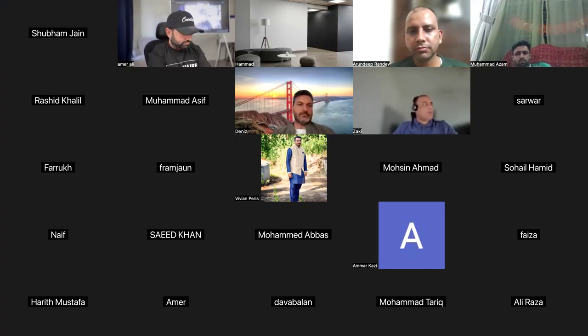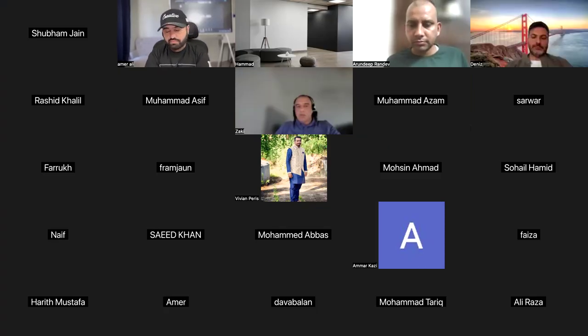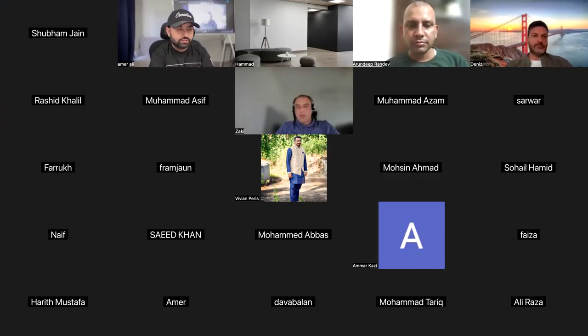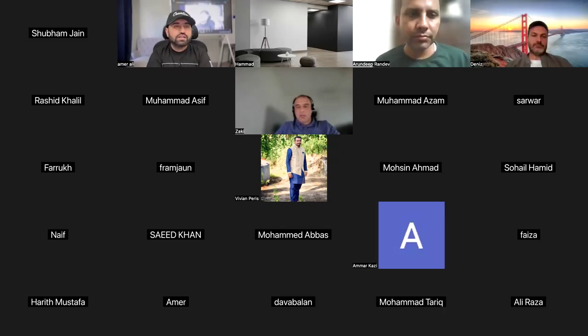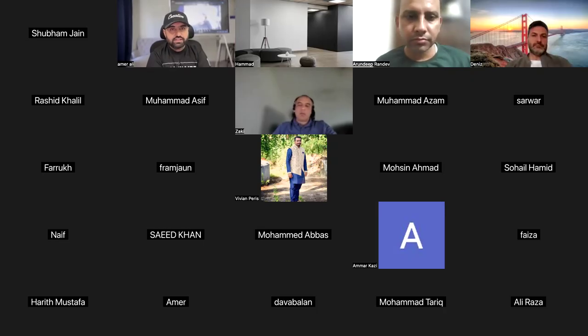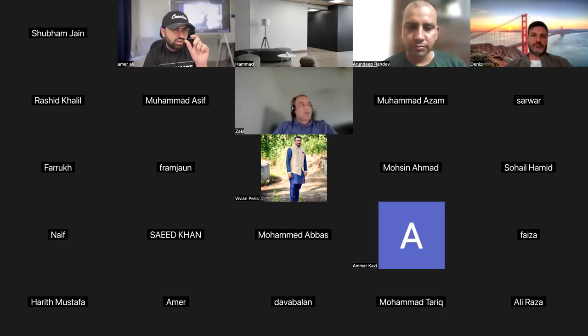Yes, Shubham. One question I asked a couple of days back on WhatsApp also: whenever a change is required, do we first do the analysis or do we first raise the change request? We first raise the change request. Because I have seen questions with a very rare scenario, where you have to do impact analysis first. For example, somebody did something without even asking, or it is immediate to do it. As a general rule, 90% of the time, you first raise the change request, then do the impact analysis. Only 10% of the time we do otherwise. That's a very rare scenario.